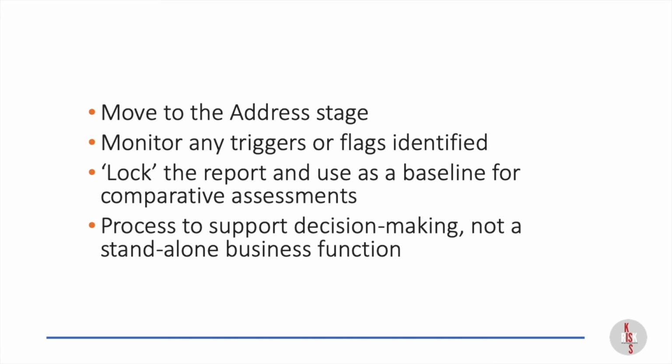You can start to put those into some kind of horizon scanning program. You lock the report. As I said, that then becomes the report. That is the risk assessment report. It's finalized, and that is your baseline for other assessments and other work. And then you're going to work on decision making.